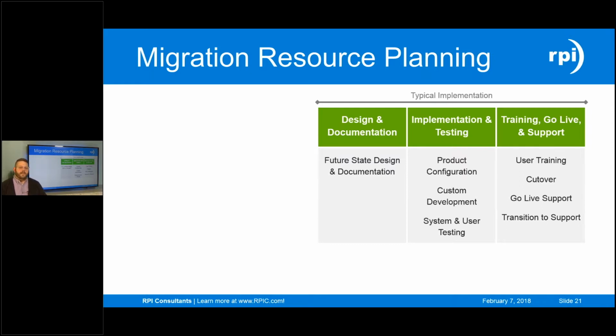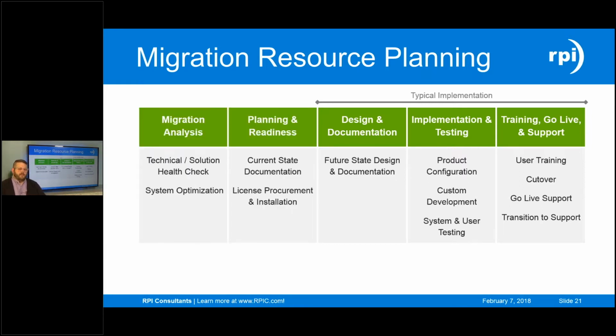If you were coming into this never having done business process automation or having ECM, we do our design, get everything documented with the future state, your future state process flows, implement, do any custom development we need, move into training, get your users testing the system and comfortable with everything. We take it live, we'd be supporting you, that's it, right? A typical implementation project. Well, in a migration, there's a couple of phases that need to happen up front.